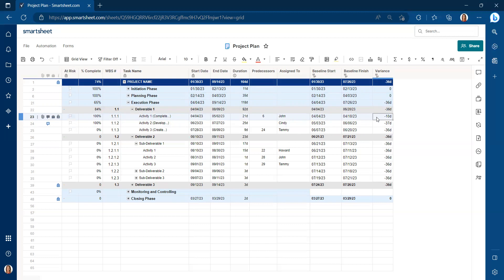For example, row 23 is 10 days behind schedule. Whereas if you look at the very top line for the project, we're 36 days behind schedule for the overall project.